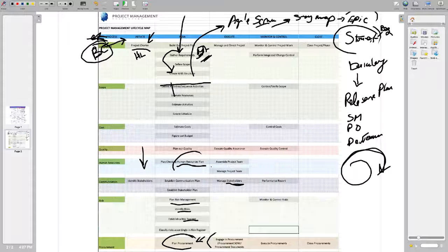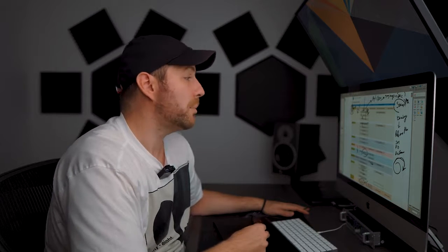Possibly on a hybrid project, you might actually not have dedicated resources. So for that, you can create an Excel spreadsheet or maybe a Microsoft Project document that you can actually use to plan resources ahead, maybe by teams, and X amount of months ahead, so that you can actually do proper resourcing for your project, or for your Agile project, or portion of the Scrum section.